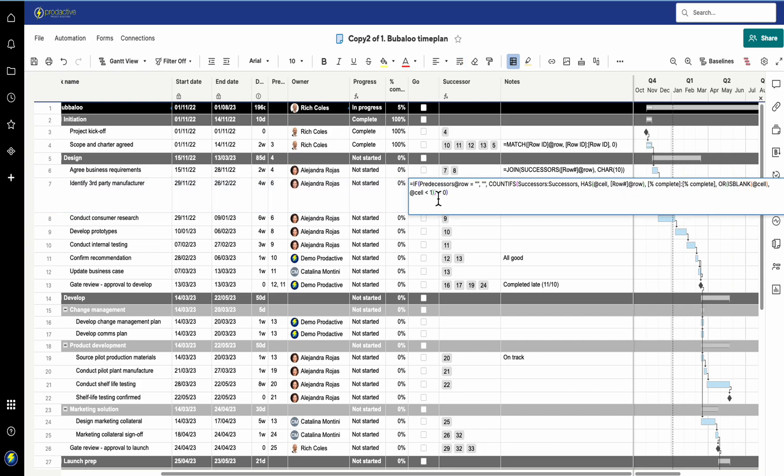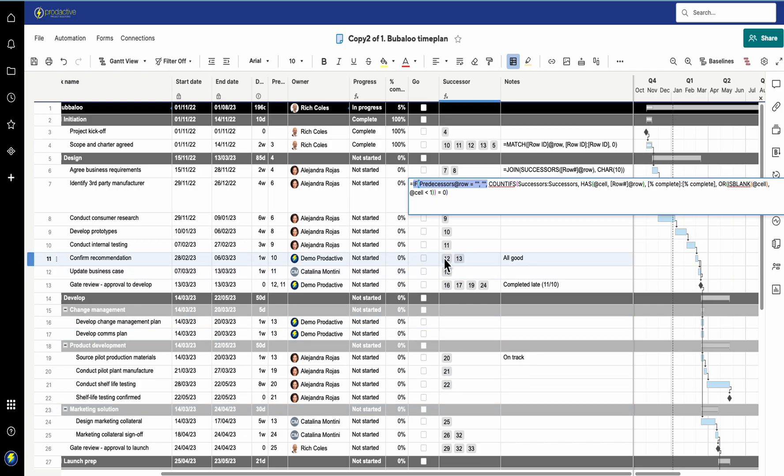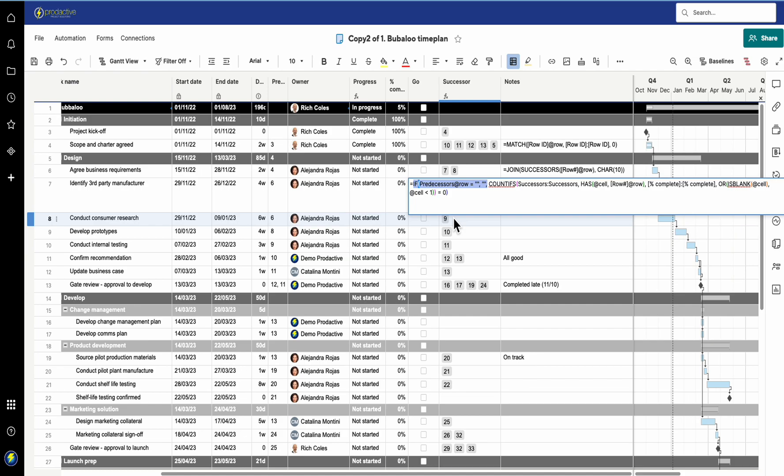One bit to flag that I've added into this formula: it's saying if the predecessor for this task is blank, then make it blank. The reason I do this is without this bit at the beginning, tasks lower down are ticked ready to go because they don't have a predecessor. For example, this doesn't have a predecessor task because it's a parent, so that will have a tick saying it's ready to go, which can be a bit confusing depending on how you're using this.